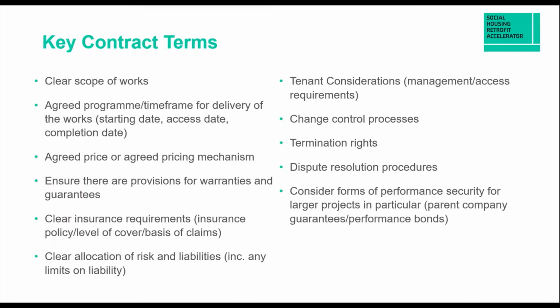The next one then, clear allocation of risk and liabilities. So it's particularly common now to have limits on the contractor's liability, but again, setting any limits needs to be carefully thought through and considered. They're often considered hand in hand with insurance requirements. So what are the level of insurance requirements, and then where is suitable to therefore cap that contractor's liability.